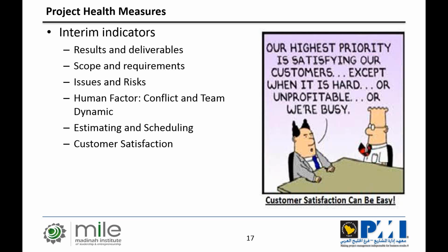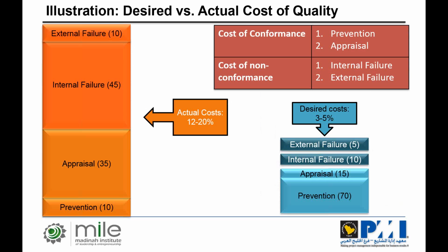They show us dynamic, they show us number of changes, they show us how the team is functioning, right? And of course, overall the cost of quality. So once I manage to actually keep track of the cost of quality, that is how much it cost me to achieve quality. So for example, if I have a document that has to go through an approval before it's being submitted, how much money I'm investing in designing the document, in completing it. And then of course, in approvals, rejections, redos, right?